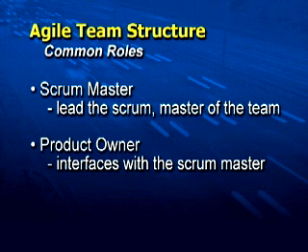So let's say I'm the IT project team for your new financial application, and you are the financial department and you're my customer. You're going to assign somebody called a product owner. So the product owner role is the role of the person from the business side that interfaces with me as